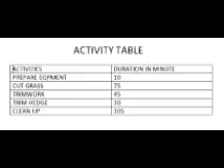After cutting the grass, what comes next? What comes next is the trim work. After trim work, what comes next? Trimming the hedges. Now, I'll stop there and I'll say something. You have to understand that it is possible to do trim work and trim the hedges at the same time.